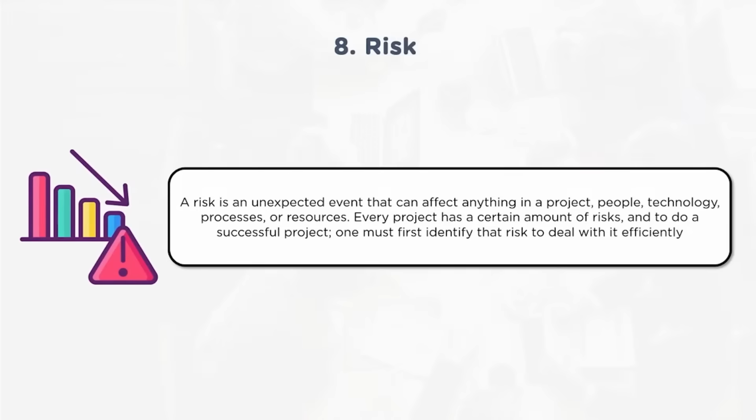Risk identification, assessment and analysis should also be done regularly, periodically, so that one has a clear understanding: is that risk still valid? Is that risk still there or not? What is the level of variation in terms of impact of the risks? So this clarity will be there so that the organization or project manager can get ready to face those risks. If it is a negative risk, definitely you should have a mitigation, avoidance or acceptance, whatever mitigation plan you have, to eliminate the negative impact of the risk when it occurs. If it is a positive risk, it's quite obvious one has to take advantage of that. One has to enhance, exploit, or share a positive risk so that the organization is benefited.